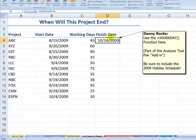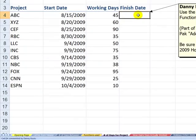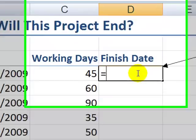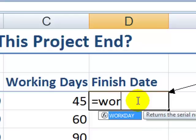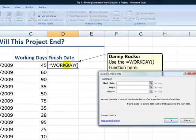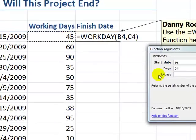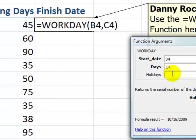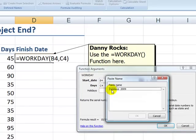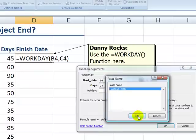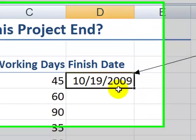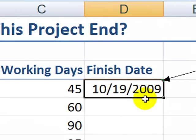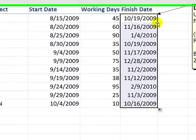Now let's come back here and revise this. We want to include — or rather exclude — holidays. So equals WORKDAY, with function autocomplete, Tab, Ctrl-A. Start date, days worked. This time we have a named range for holidays, so let's use the F3 keyboard shortcut. Here's our named range: holidays_2009. Click OK. And now you see that our project will finish on October 19th, because we excluded weekends and holidays. Let's copy that down.